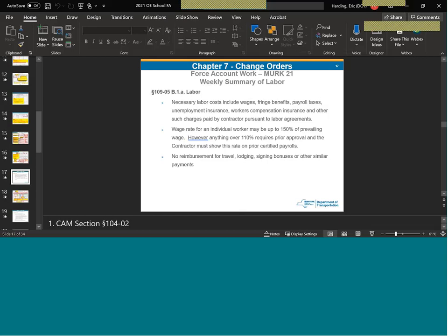The next question is about cash fringes, and I think, Mike, if you're there. Yep, I'm here. Could you help out with this one? You wrote a very good response. Basically, if you have cash fringes, where they're paid directly to the worker, then you're entering a fringe rate plus the cash fringe amount, because the cash fringe total is there basically to apply the 6.4% markup to, but it's not going to be included in the labor subtotal. So you want to basically enter it twice.